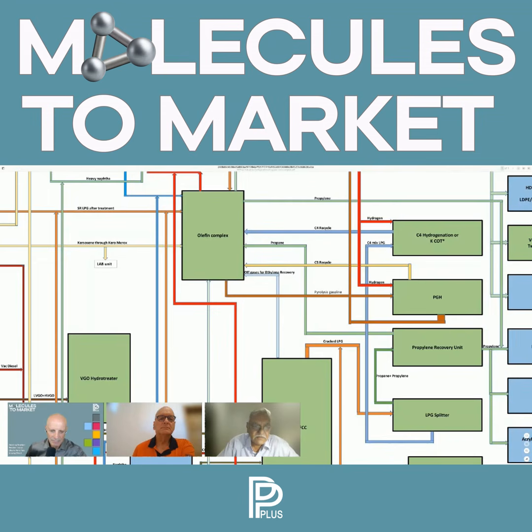So one or two government appointees are there. So anyway, the federal government is with them in the decision-making process. With the state government it is a strategy, because without that, it cannot go for a board approval. So I need the state government's approval on the land. What is it they are offering? What incentive are they giving? Because before it goes to the board, all these things should be settled by way of documentation.